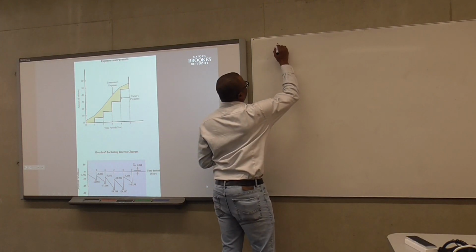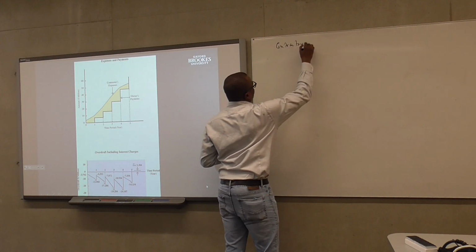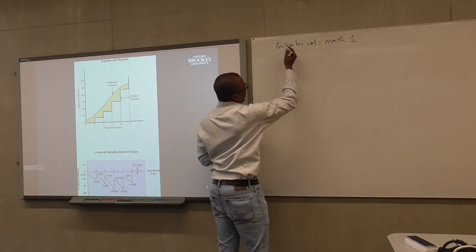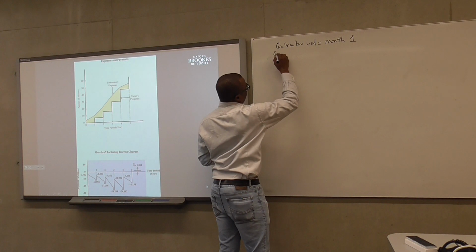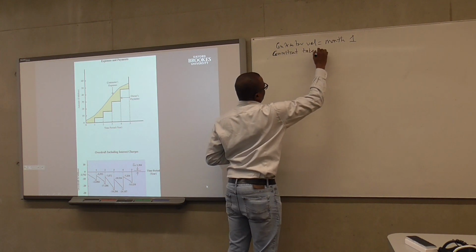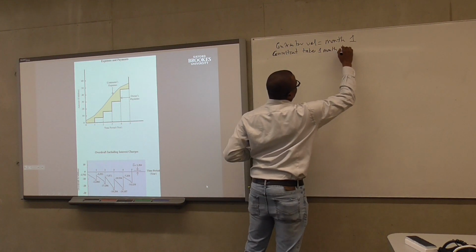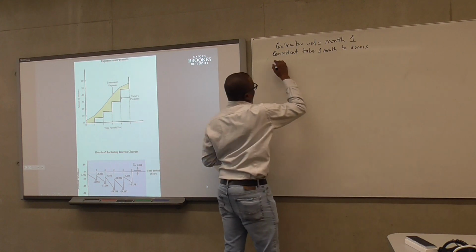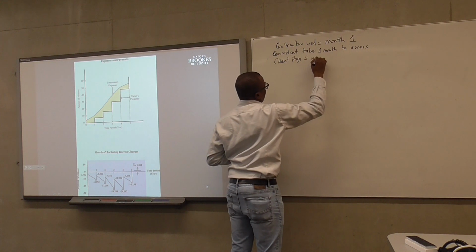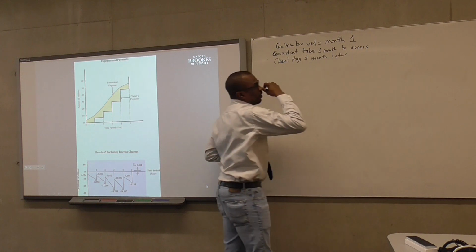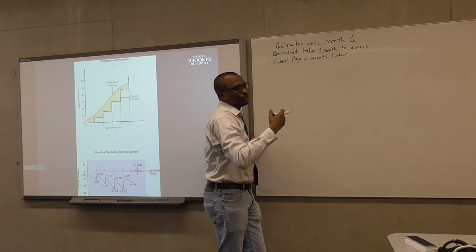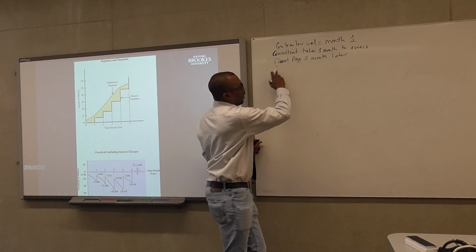Let's assume you submit your valuation in month one, and then maybe the contract says that the consultant uses 1 month to assess the valuation submitted by the contractor, and then the client pays 1 month later.